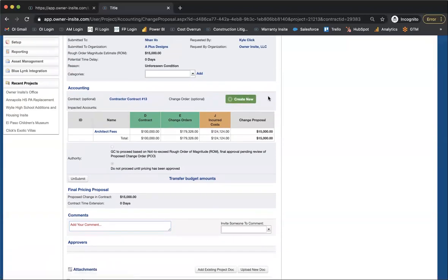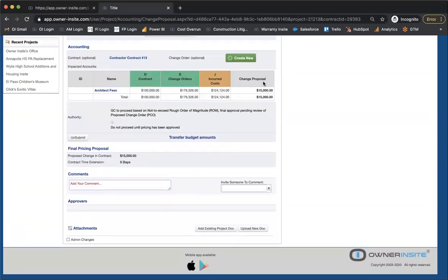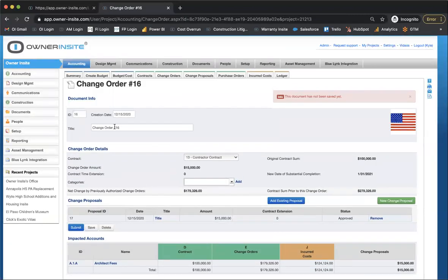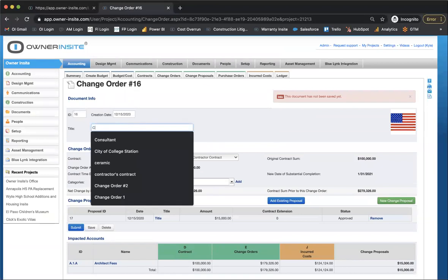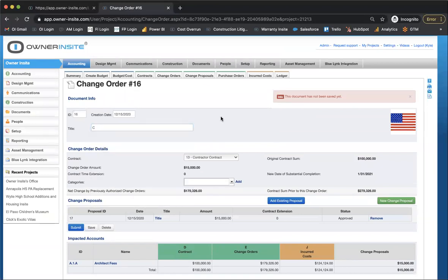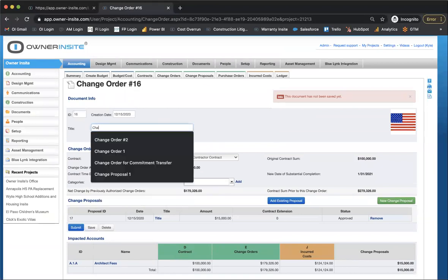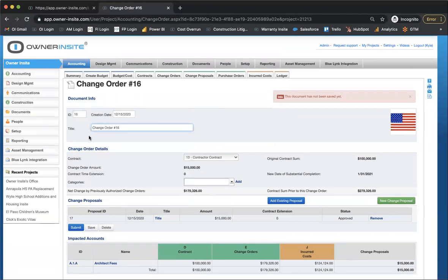The way that we have it set up through us is the architect officially approves the change order after they've received approval from us. So usually the signature blocks include the architect, Holly with BGC, and then the GC. And so once all three have signed on, the architect uploads the change order to the system and approves it here. So perfect.